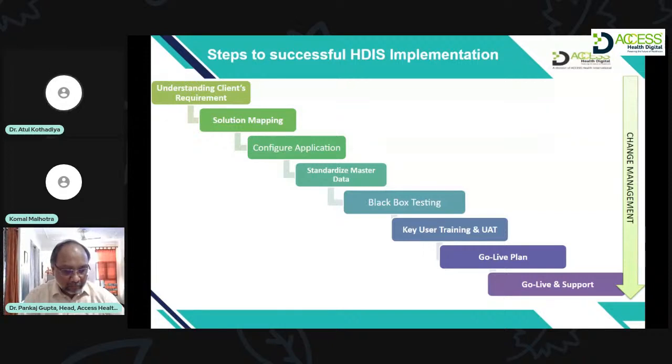Now, for each and every stage listed in this slide, the client or the vendor will take a sign-off on a written document that all the requirements are recorded correctly and correctly identified by the implementation team. This formal process is called a sign-off process.